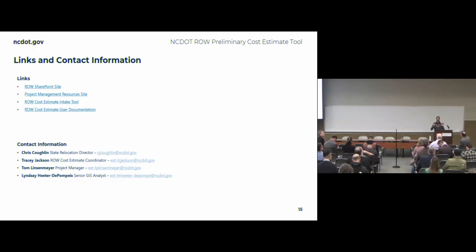So what we've done is, for the late stage of GIS, the cost estimate worksheet is going to be generated on the late stage, so the next step, basically. If your project area is the same parcels, the numbers are going to be generated the same. So if you're looking at both your estimates side by side, the parcel numbers should be exactly the same. I don't know if parcel IDs change, but even if the parcel IDs change or the property owners change, they're not going to match the plans specifically, because it's kind of hard for the tool to look at that and regenerate that.